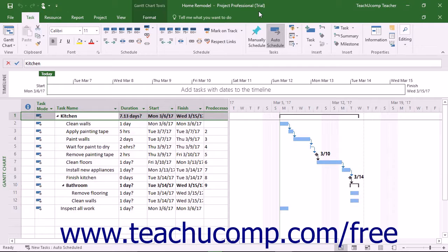People resources can either be specific, like a specific person with a unique or necessary skill required to finish a task, for example John Doe, or they can be general, like the name of a general type of worker needed to complete a task, for example an electrician. Either way, you enter the work resources, their availability and associated cost as a resource in your project file. In a later chapter, you will then learn how to assign these resources to tasks within a project and let Microsoft Project schedule the work assignments as needed.